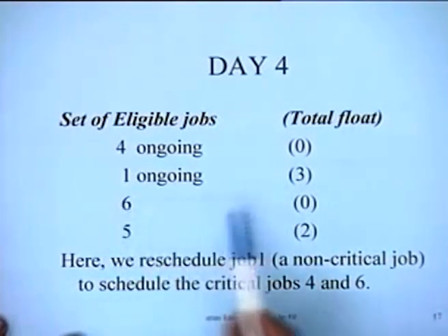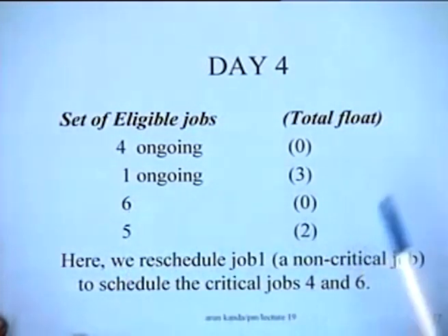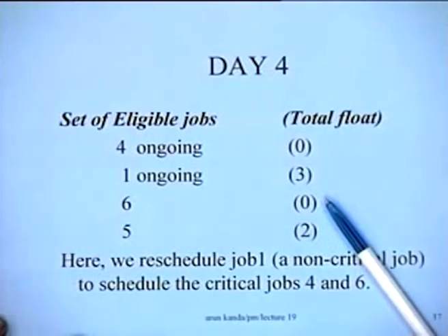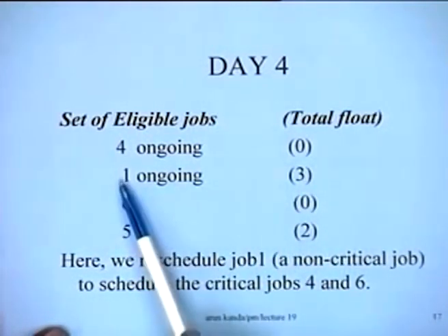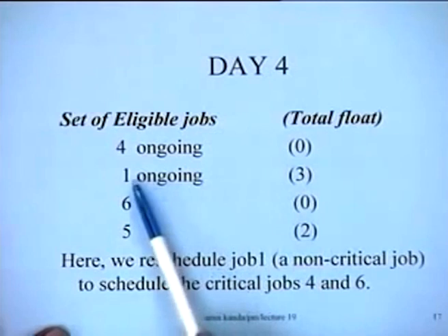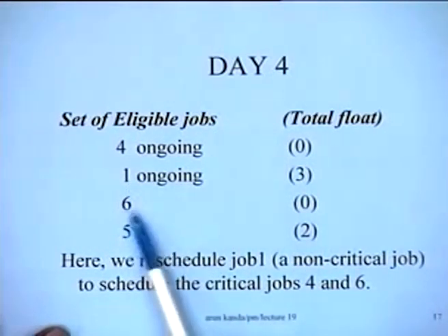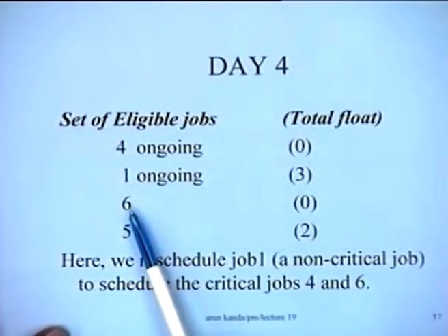The critical job is clamoring for resources, and at this stage we can invoke heuristic 3, rule number 3 of Wiest's procedure, because what we notice is that here we have an instance of one job which is a non-critical job, consuming 1 unit of resource only, but here is a critical job which is asking for resource and cannot be accommodated along with this.